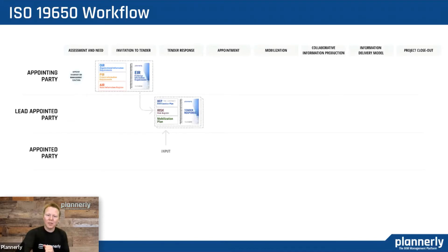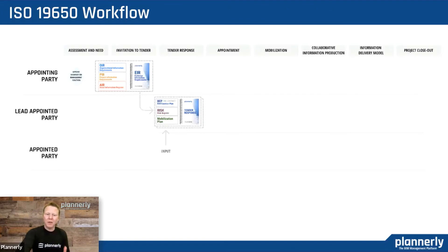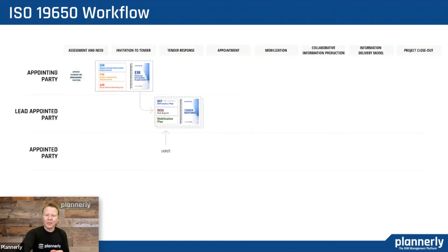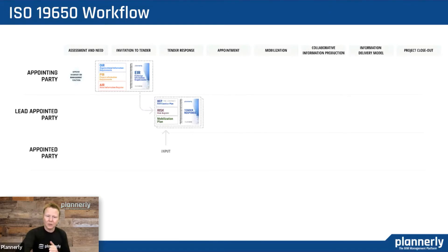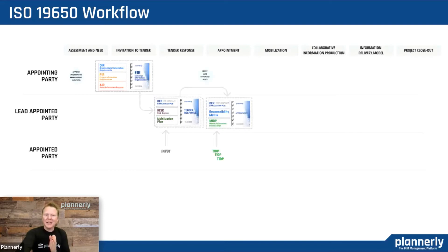Multiple responses with multiple pre-appointment BIM execution plans, potential risks, and mobilization plans form a tender response with input from the potential task teams that the lead appointed party has. The next part is when you make an appointment.